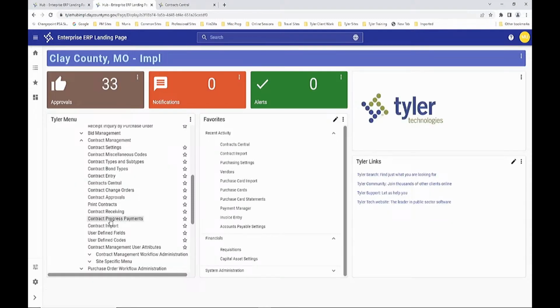The other thing is you could put contractor progress payments directly in against a contract that would create an AP payment. It would push out to the AP module to create the payment, but it would be initiated in the contract module rather than going out and entering an invoice associated with a contract. So that would be something we could do for our outside agencies, those contracts that are awarded every year and budget, they come out of the budget as opposed to the encumbered contracts.